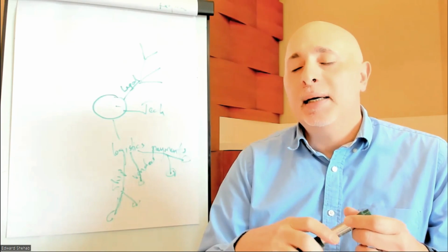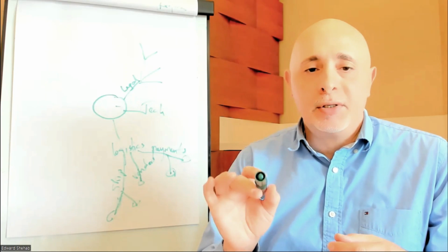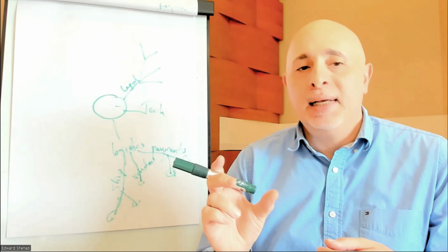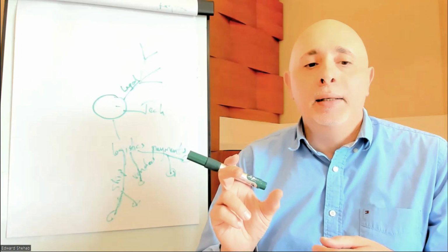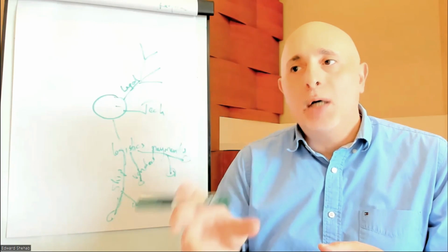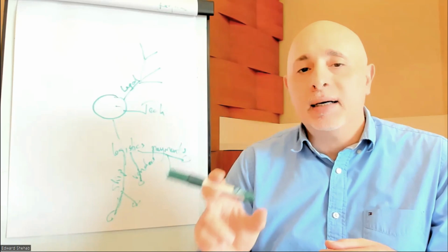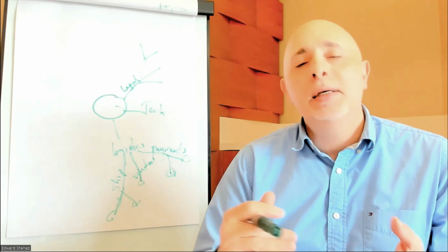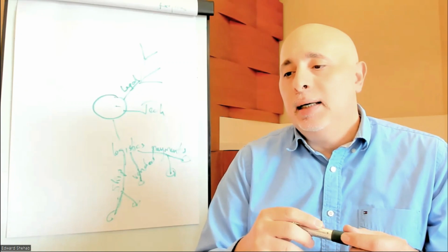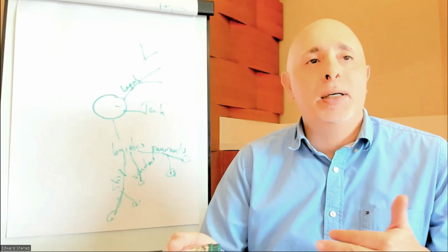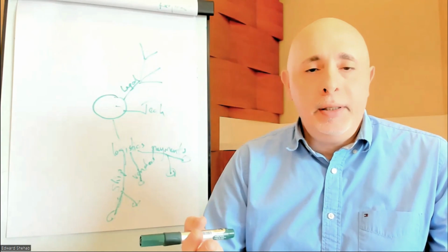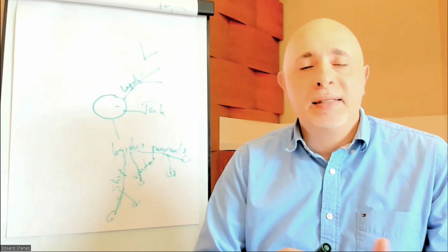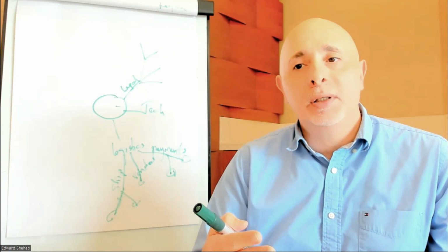Sometimes contracts are the most important things because you've got to watch for language that is used that is great, and that's kind of scary. Sometimes your contractors or other parties, when they write stuff, they write it intentionally vague to their advantage, okay? So you gotta watch for these things. Something that says, for example, all parts or all material must be on site within, let's say, 1 day of notification.